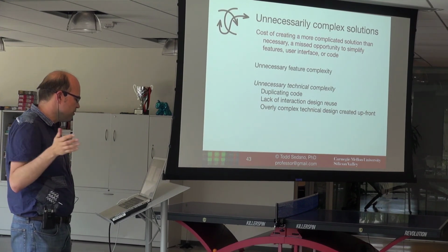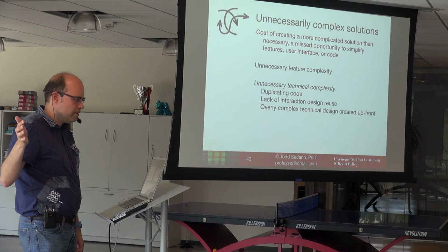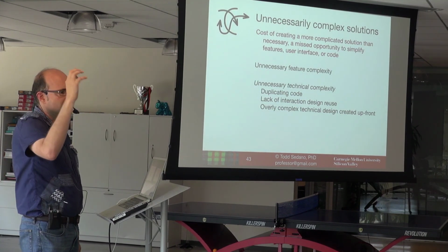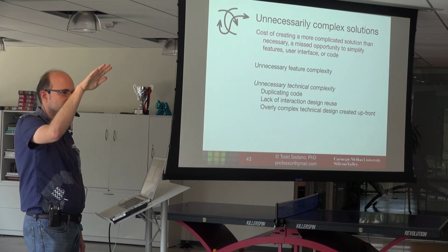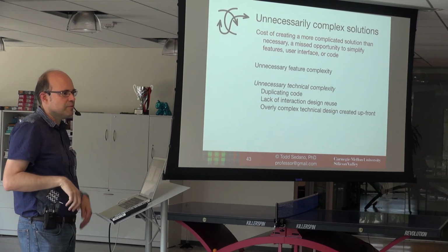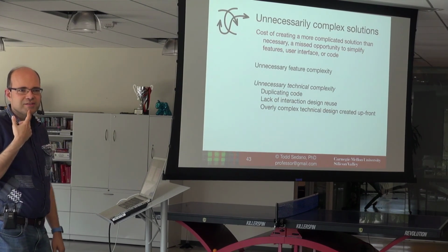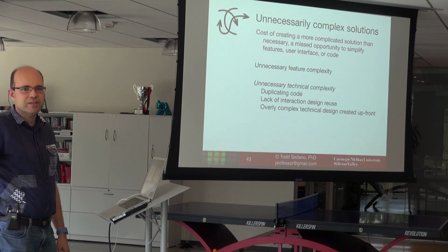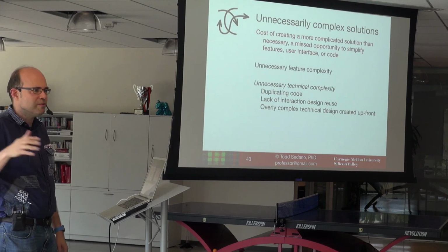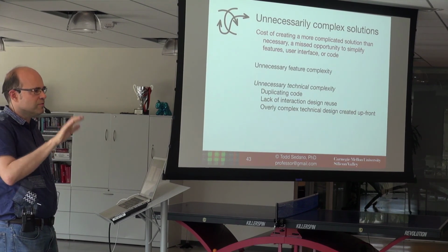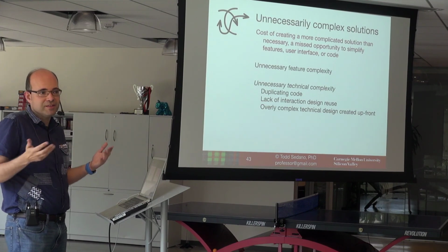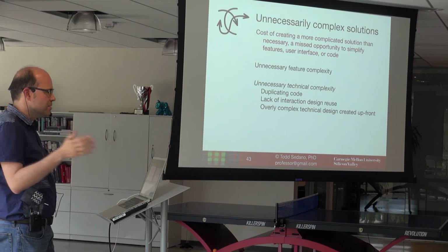In one project, we built a series of pages that scrolled horizontally. The user did something really complex. And then in the checkout process, we scrolled vertically. And after we launched this, several of the engineers asked the designer, well, wait a minute, why did we write all this extra navigational code to handle horizontal navigation and vertical navigation? Couldn't we have done everything as either horizontal or vertical flow? And the designer never thought of this. Neither did the team. We could have saved some time simplifying that flow down.